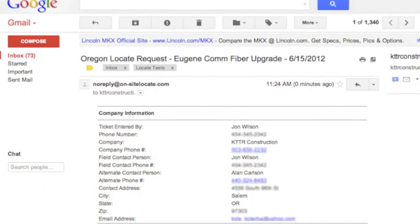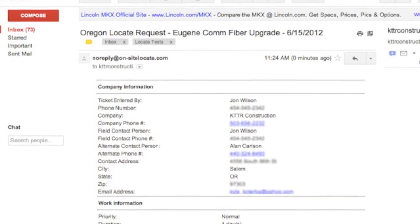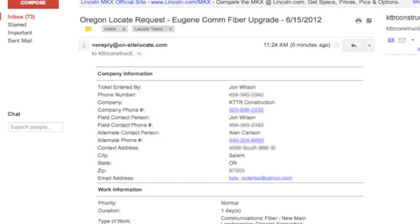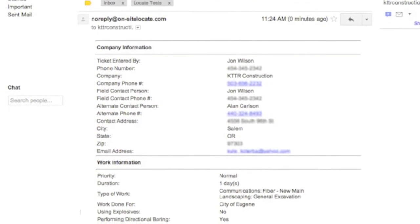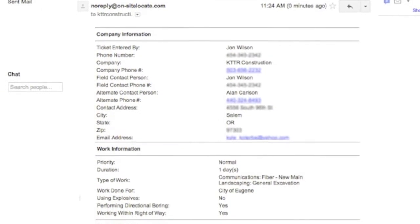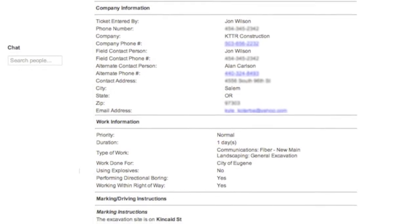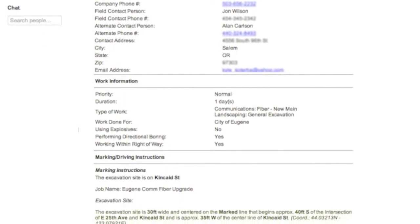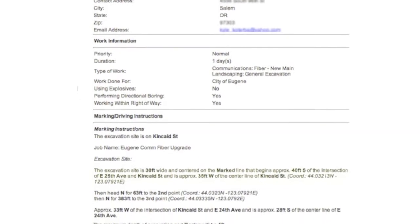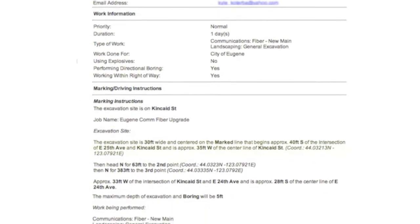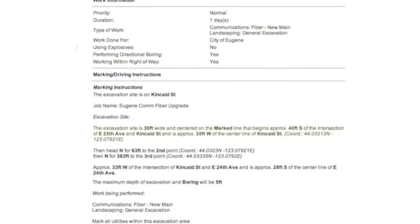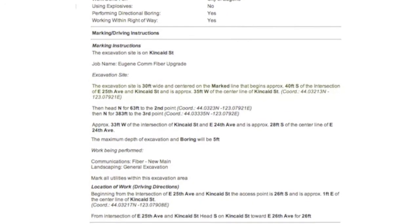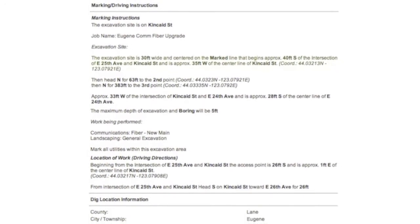After the site superintendent has finished collecting his information and submits it, it is sent directly through email to a project manager or someone else in the office. The email is automatically formatted to display information in the way the OneCall system requests it, providing a distance and direction calculation from the nearest intersection, the distance between each point, the driving direction, and other useful information about the dig site.